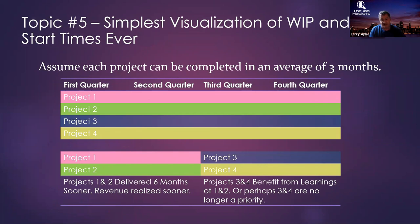Here's a simple visualization from Reinertsen's book. I have four projects — or features, or stories — four things. Let's assume that for each work item, they average three months to complete. If I start all of them at the same time and work on all of them simultaneously, theoretically it would take me 12 months to complete them all. Reinertsen calls this a CEO diagram because it's so easy a CEO could understand it.